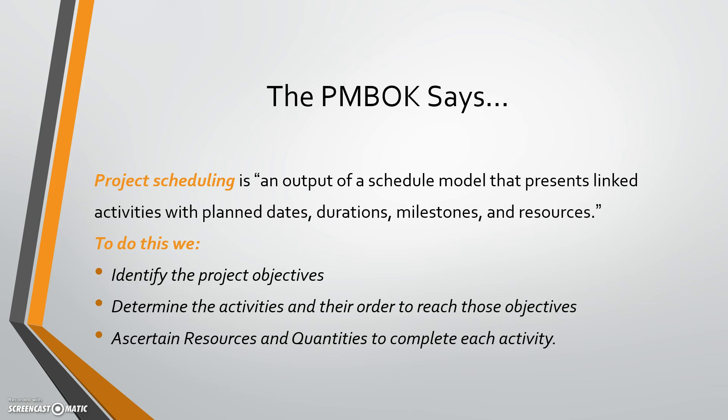First, let's start off with what PMI says. Project scheduling is an output of a schedule model that presents linked activities with planned dates, duration, milestones, and resources. So basically in project scheduling we identify what we're going to do, what it takes to get there, what order those things need to go in, and then what resources — quantities of resources, labor, people, and technology — are necessary to complete each of those activities to reach those objectives.